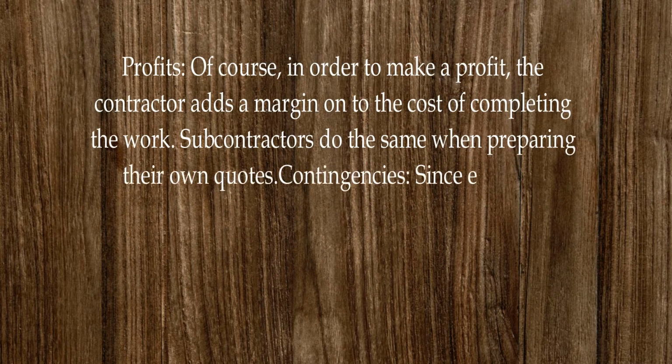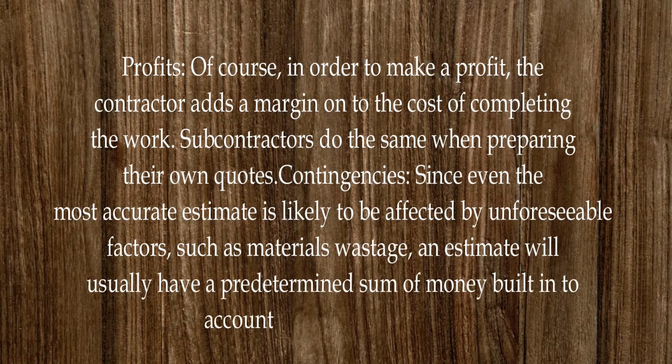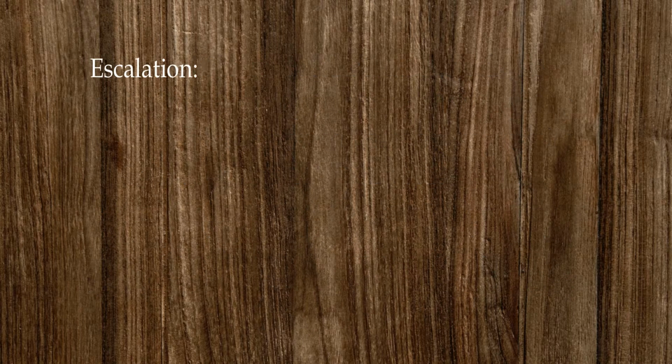Profits. Of course, in order to make a profit, the contractor adds a margin onto the cost of completing the work. Subcontractors do the same when preparing their own quotes. Contingencies. Since even the most accurate estimate is likely to be affected by unforeseeable factors, such as materials wastage, an estimate will usually have a predetermined sum of money built into account for such added costs.